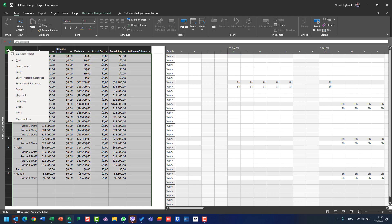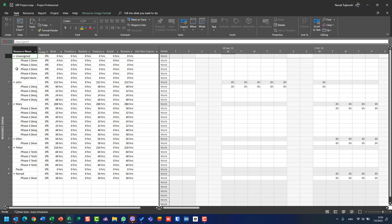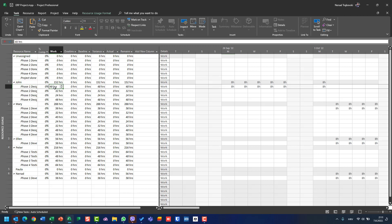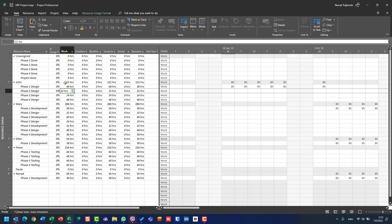Let's switch to Work. In Resource Usage view, I can see that John is supposed to work in total 152 hours — 48 for Phase 1, 32 for Phase 2 Design, 24 for Phase 3 Design, and 48 for Phase 4 Design.